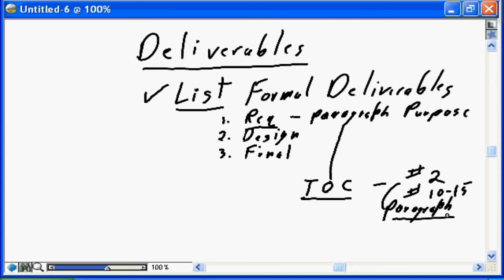A small one-person, 3-month project? I don't believe you're going to do a deliverable definition down to the table of contents with estimated number of pages with a narrative for each section in the table of contents. That's too much detail for a small, simple project. But for a very large project that involves hundreds of people and years' worth of effort, defining the deliverables at this level of detail is absolutely essential to ensuring that you are able to understand, able to manage, and able to deliver to the business's expectations.